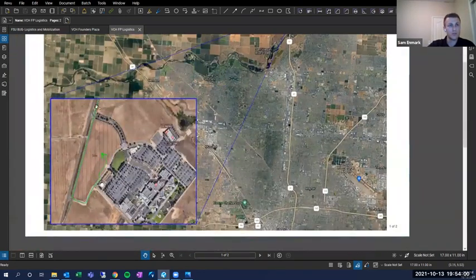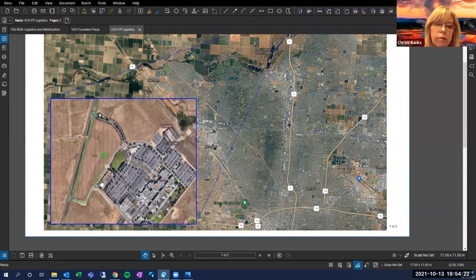So once you're going through Children's Boulevard here, we actually make our crews go past the main entrance to the hospital and come on this little side road and then wrap around and come back this way. And the reasoning for that, as Carrie mentioned, is we don't want to be on this road because this is where the ambulances come, right? And the absolute last thing that we want to do is to have a 53-foot truck that didn't know where it was going, that got stuck on this road, and there's an ambulance coming behind with a kid that needs help in this building, and we're hindering that, you know?